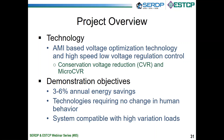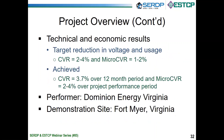There were some performance objectives required by this project. The key objectives included, first and foremost, targeting safe voltage reduction leading to energy savings between three and six percent. The demonstration, more importantly, could not disrupt mission performance at the installation. As we review the results later in this presentation, I think you'll agree that we hit our target successfully.